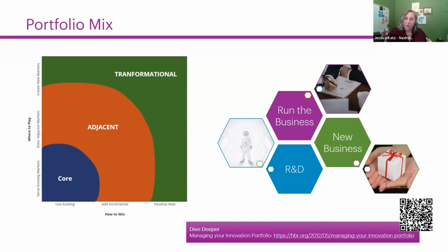And really put the whole mass of your workforce behind the thing that's the most important, just like we would do on a Scrum team, where a Scrum team has, these are the 5 user stories we've committed to. The number one user story, we're all going to swarm. Everybody's going to work on that one that can, and then we'll pick up number 2, and everybody else will work on that can, and then we'll pick up number 3. Instead of 5 different people working on 5 different user stories, you want to do the same thing at your strategic level, and really focus on getting that number one thing over the finish line. And though it feels counterintuitive, it actually speeds up your productivity across all of your products and ideas.